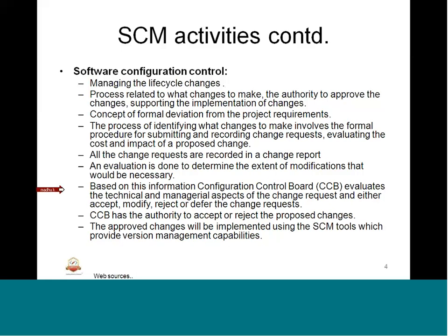So after the evaluation, what we do is there is a CCB, change control board. It comprises both technical and non-technical people in terms of deciding whether the change is necessary and can go ahead for the next updates. That will be decided in the CCB, change control board.